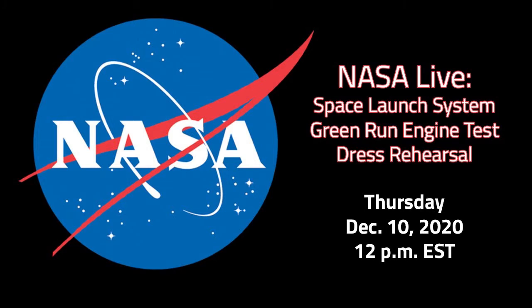After wet dress rehearsal is complete, we'll need several days to analyze the data and determine if we are ready to move forward with hot fire testing. We also will be replenishing all the fuel and the commodities, which are pretty significant, to get the facility ready for this kind of test, but also to conduct the test. So we're doing that also this week.